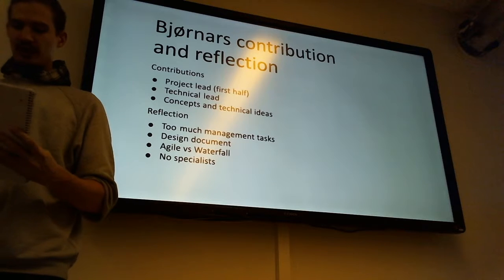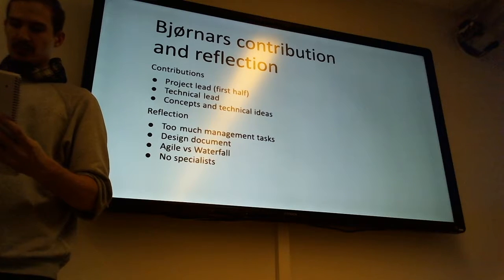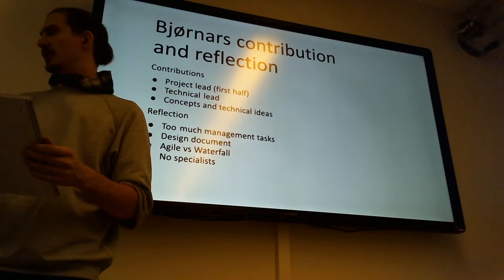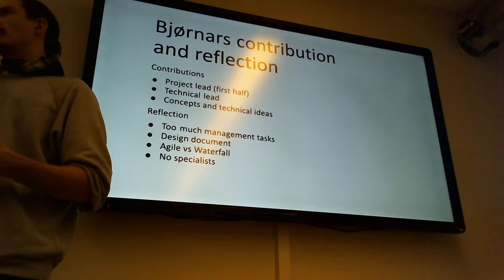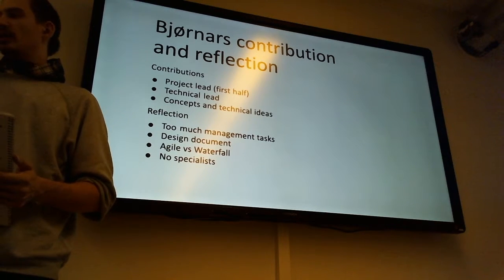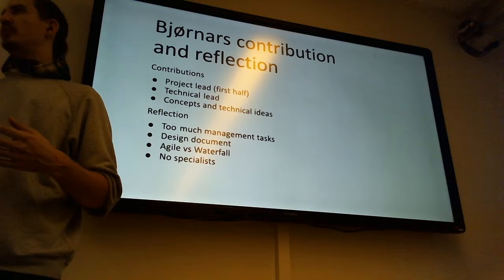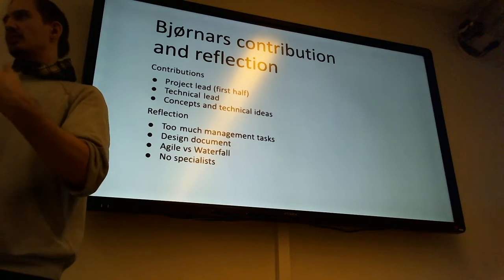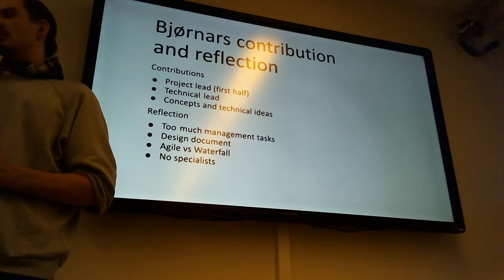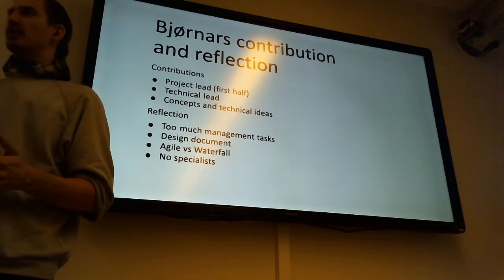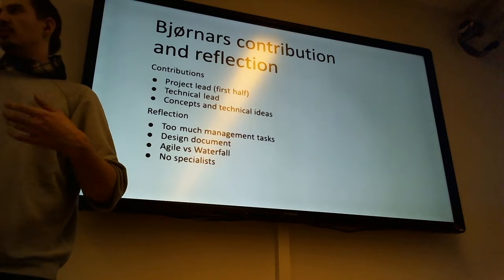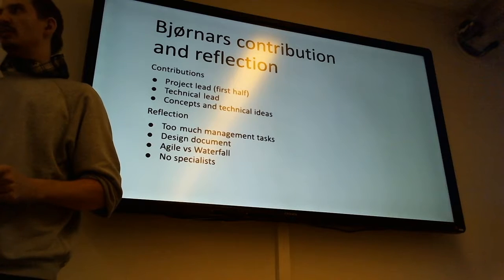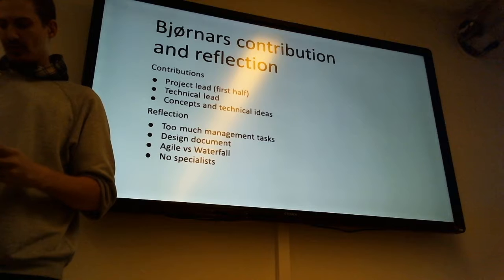One thing that we learned maybe a bit too late is that we gave ourselves homework to work on towards the next sprint meeting, or weekly meeting, that ended up with a lot of miscommunication. As we worked together, we didn't develop the same codes. We had our separate hubs that we worked on, and when we were supposed to merge it, nothing was ready. We had a different structure for various components. But when we started to work together, sit together, we managed to hash that out in a better rate at least.